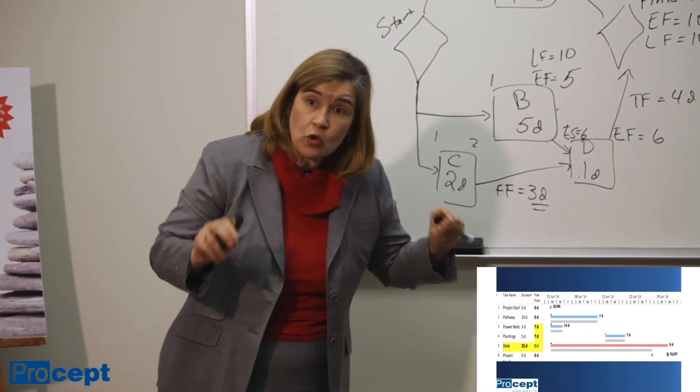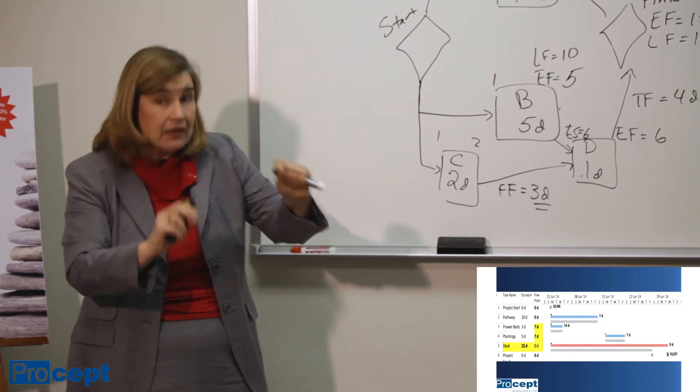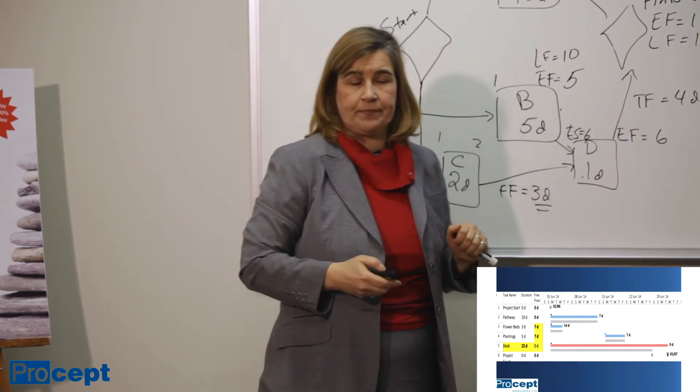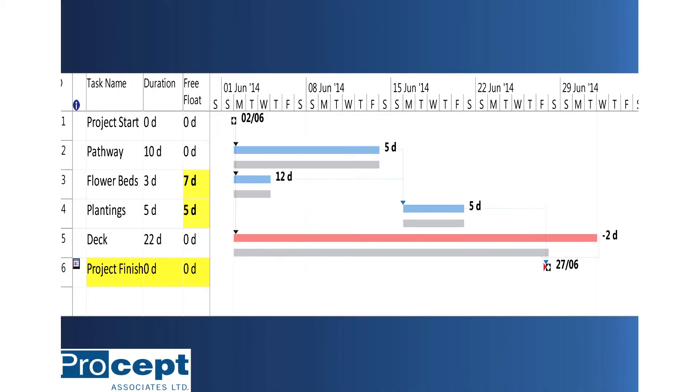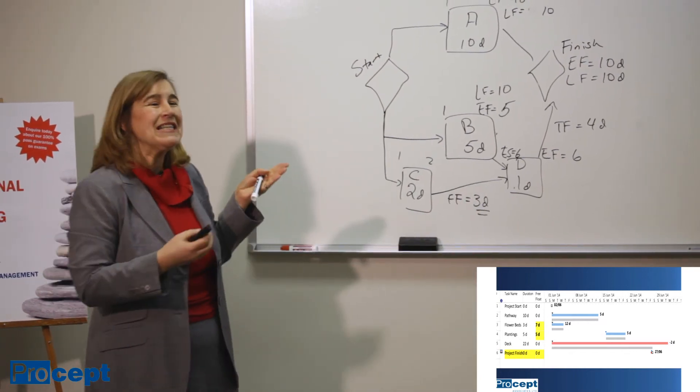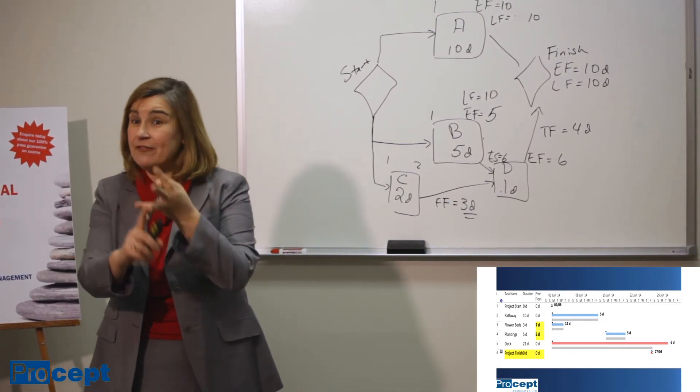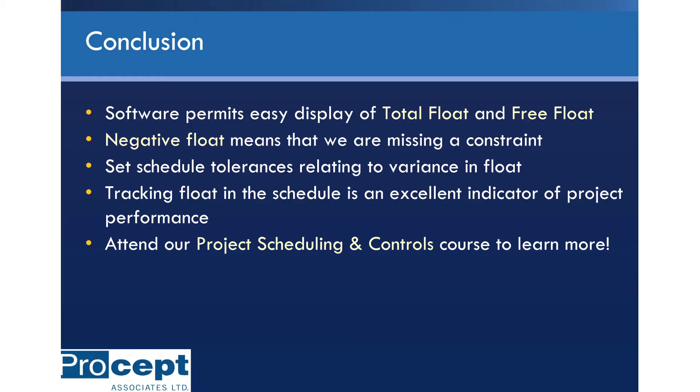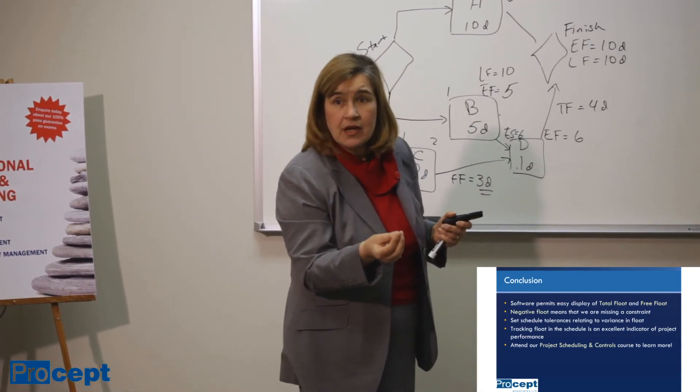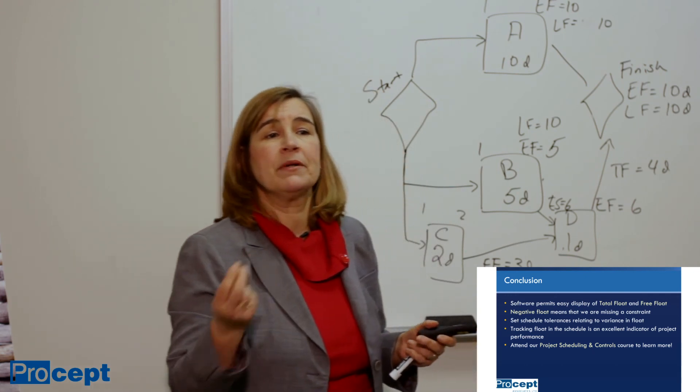Now, if our client told us that the finish date cannot slip beyond the 26th of June, then we tie that finish date with a constraint. And then, if deck slipped by the same amount, you would see that negative float on the schedule. So this is brilliant, because if you're using scheduling software, you can see total float and free float very quickly and very easily. And now there's this concept of negative float that shows up if you have constraints in your schedule, which acts as an early warning sign to project managers and schedulers to warn us when we are missing a potential deadline.